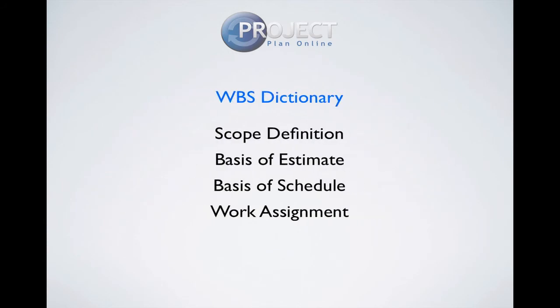So what do these two documents mean for us? The Basis of Estimate and the Basis of Schedule build up a much more important body of knowledge in your project — the WBS dictionary. So along with your scope definition, your Basis of Estimate, your Basis of Schedule, and how you're going to assign the work based on those groupings of work, this makes up your WBS dictionary and becomes a crucial document in all your project control processes for the project execution.